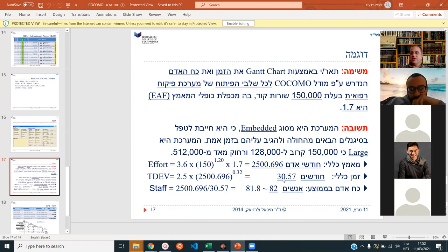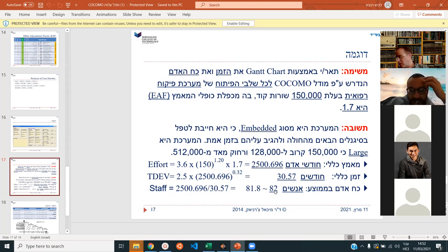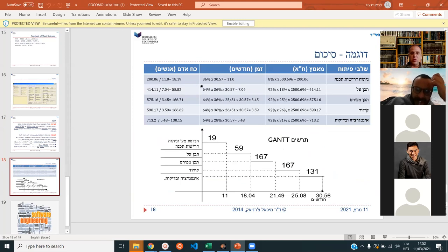We now know it's going to take about 32 months — two and a half years — and take 82 people. But we don't know how many people at each stage, or how long each stage will take. That's the question — in order to make our Gantt chart showing the different stages: first, second, third, fourth.